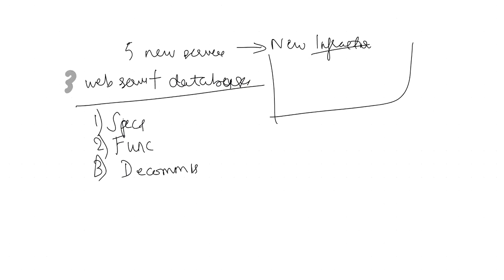So if you think about it, there are different stages that you need to consider, right? So what does it mean now? The level one, there should be different level ones, right? The major task first here is to obtain equipment. So you have to purchase your 3 web servers and 2 databases, and ship the equipment to your new data center, right?